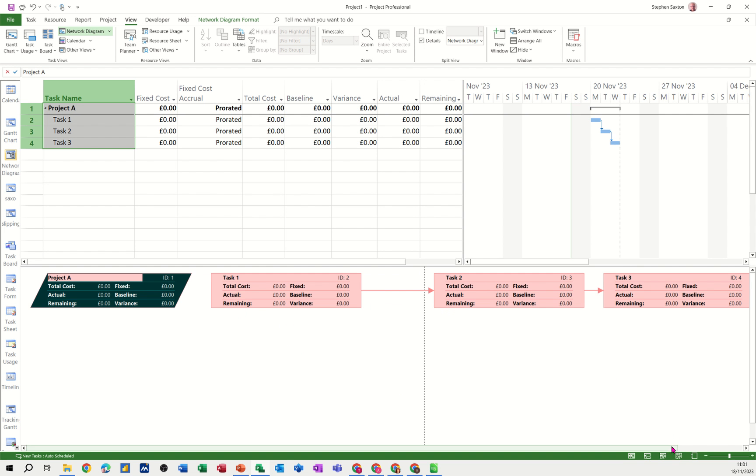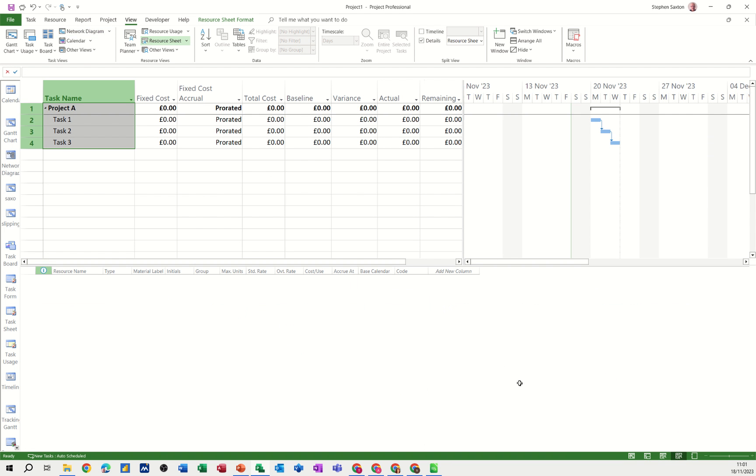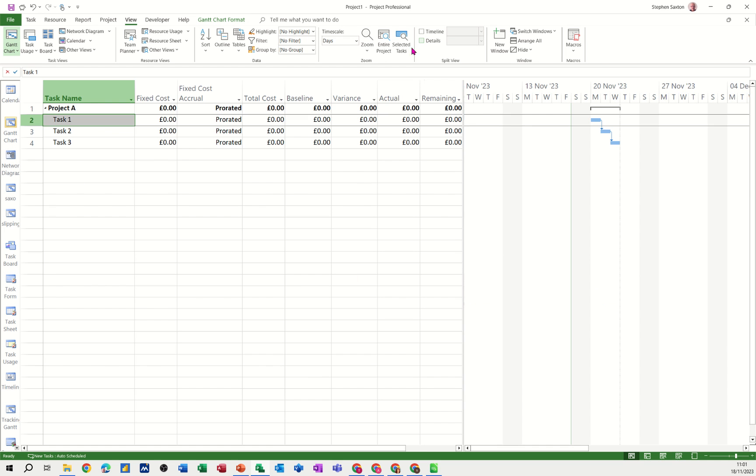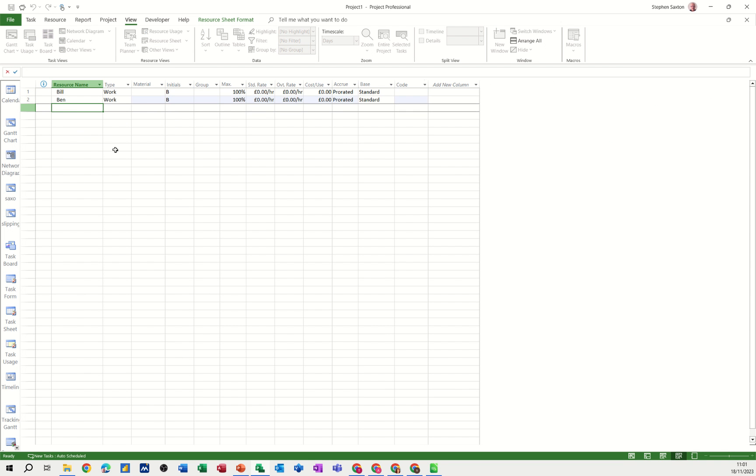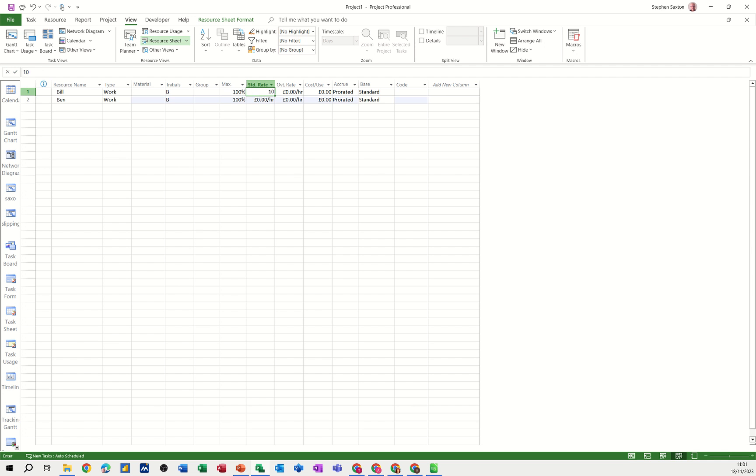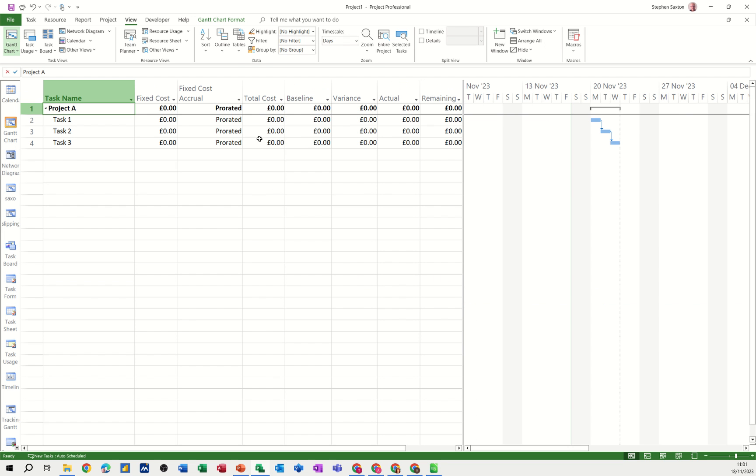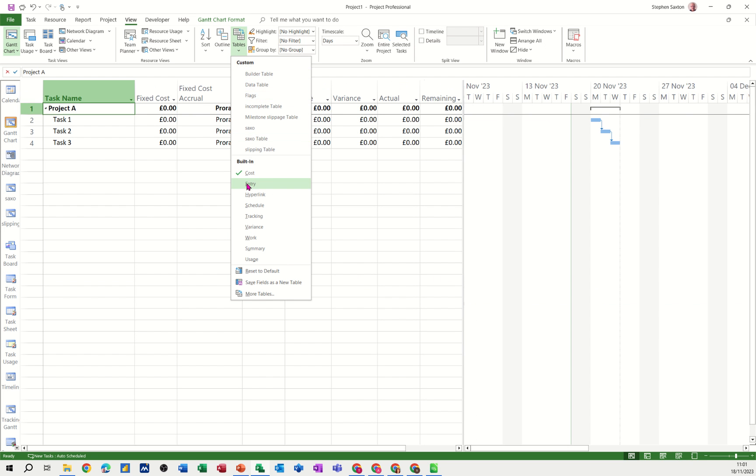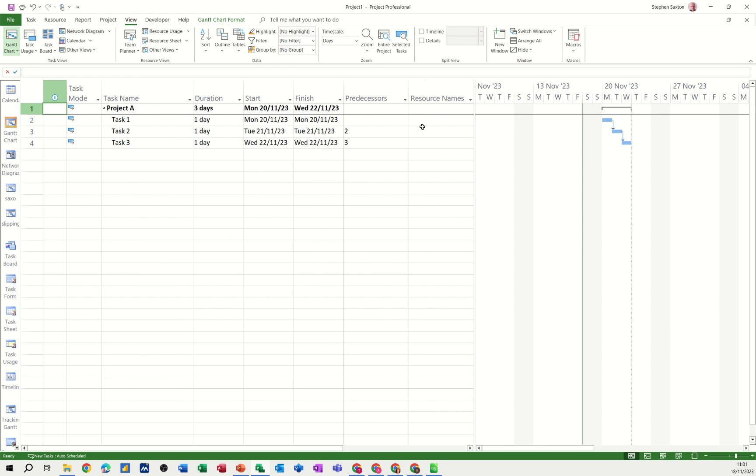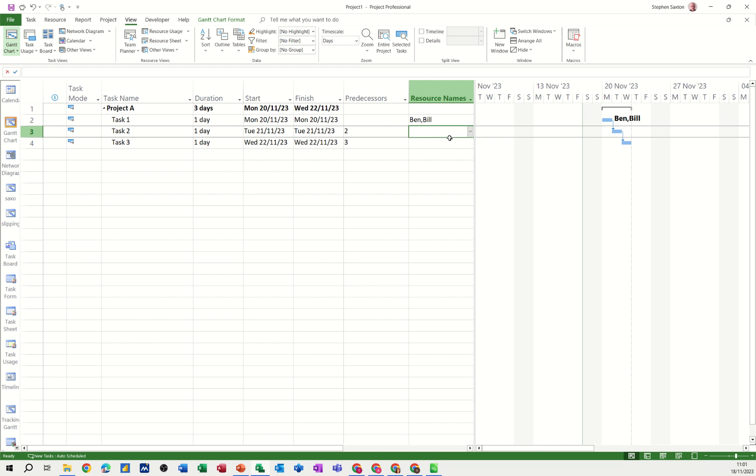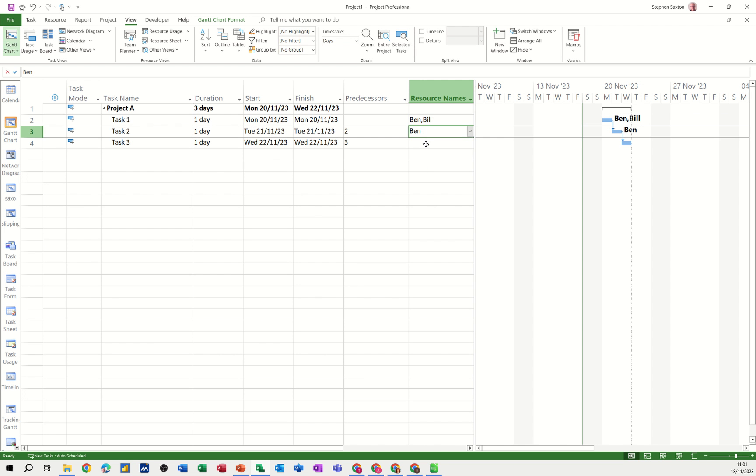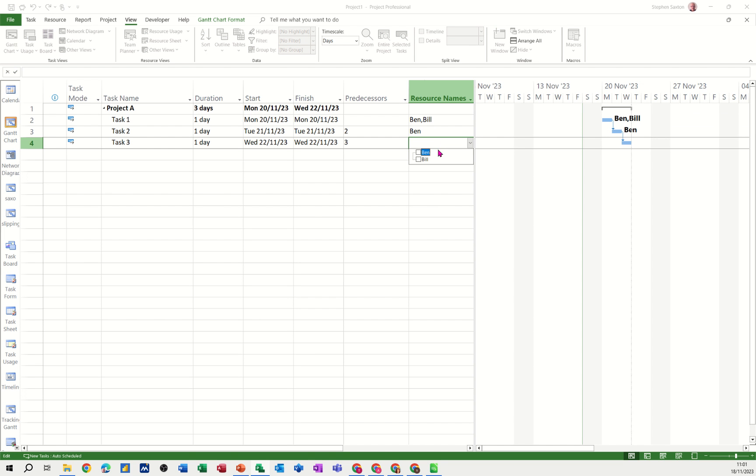But if I just go to the resource sheet and add a couple. Let's take the split off and do that. Let's go to the resource sheet. Let's add Bill and Ben, they can both be on £10 an hour. So now I will have some costs if I allocate these people. I'll flick this back over to the entry table and then you can allocate these people to these tasks. So I'll add those two to that task and then Ben to that one and then Bill to that one.